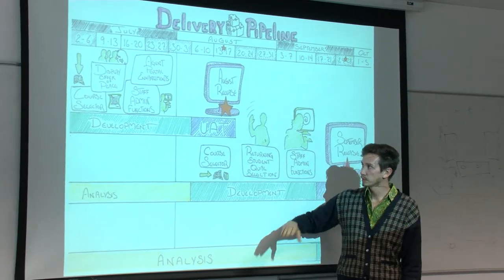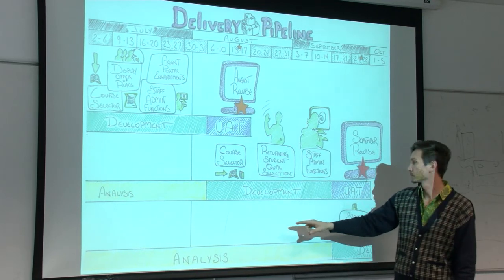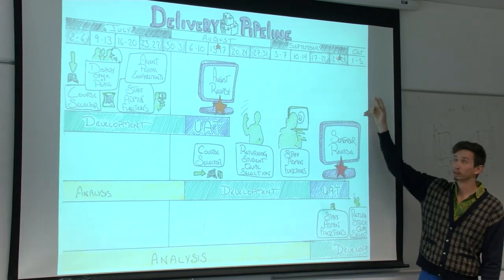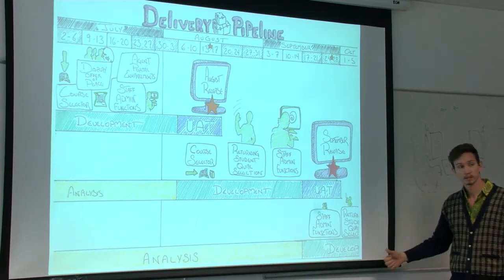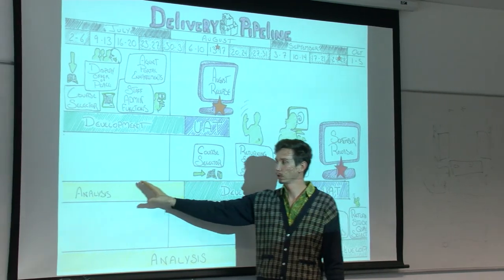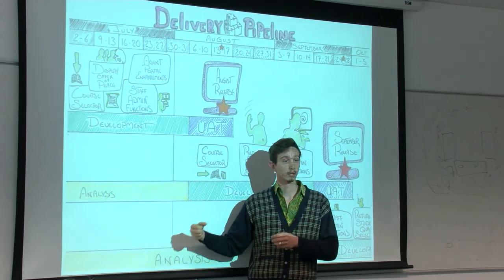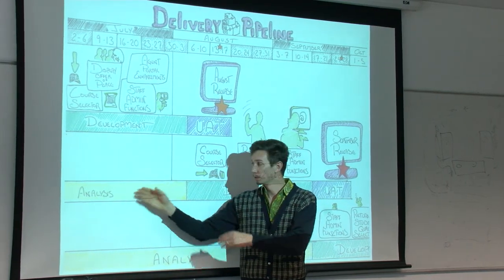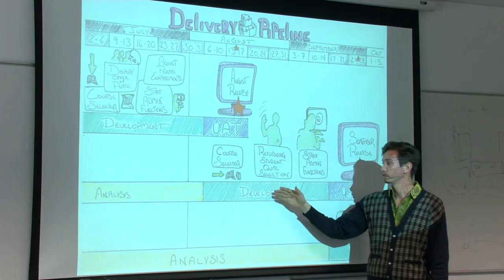And so as you can tell, when the business analysts are talking to you, they may be talking to you in July about something that's going to release near October, or something in July that's going to release in November. But if they don't have their requirements in order, or they're not able to get access to users to test with, or there are delays in communication here, then you can see how it has a ripple effect.